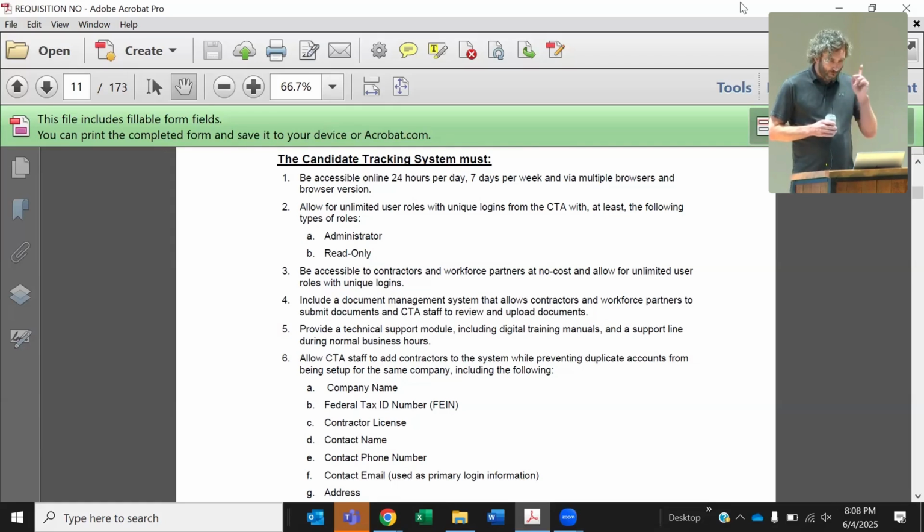We're doing a design right now for the Plaza Saltillo. It's going to get a new station with double track down to about Chicon, and I think the estimate was probably off by 15%, and so that's a lot of money. And what happens when an estimate's off? Nothing. They say you just have to write it up. They call it a fair and reasonable assessment. So you say, my numbers were so off because I didn't realize that engineering firms A through C have upped their rates by 20%, or steel has gone up, or whatever. Go ahead.